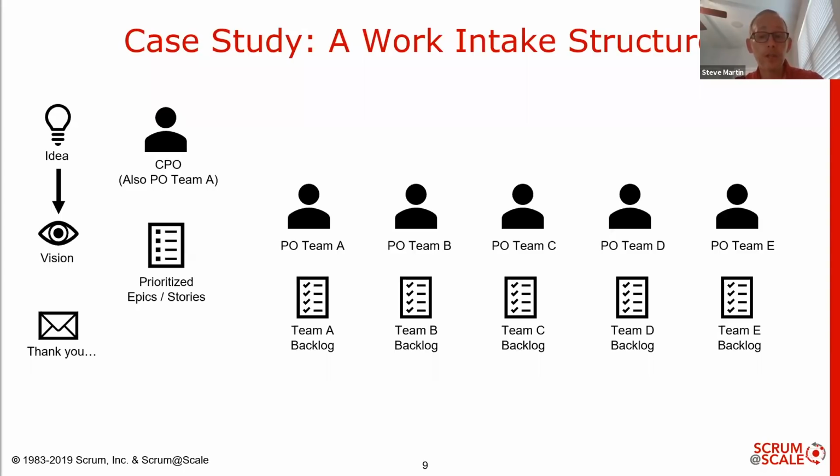If it aligned with the vision, it went on a backlog as a pending status. If not, the requester was told, thank you very much for helping the product grow, and the idea was shelved. So what happened then was twice a week, the CPO got together with a set of product owners for that product to evaluate that idea. Now, this didn't take them long since there were only 2, 3, or maybe 4 ideas to look at, unlike the monthly governance meeting where they looked at a few dozen and it just took forever.